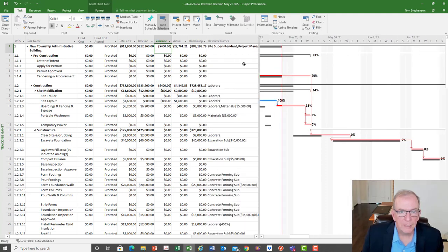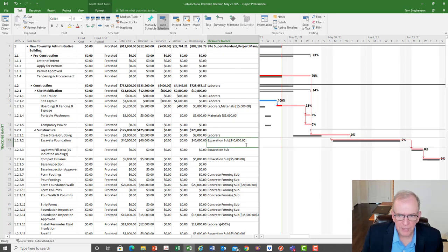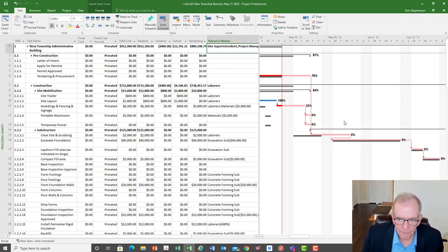That saved me $400. You might be wondering, well, how could that have saved you $400? Well, it means that I had the site super and project manager assigned to the whole project. And I also had, well, I don't think it's saving me anything there. I had the excavation sub assigned at $40,000. So I think my big savings is with the superintendent and the project manager. I've saved all that money out of here, and I reduced the overall duration.